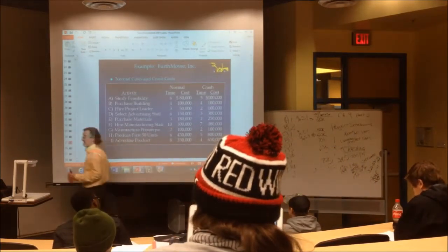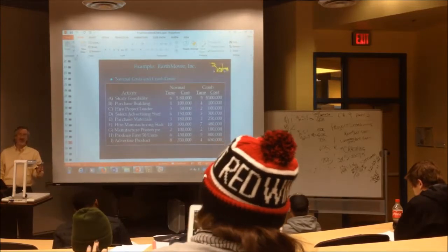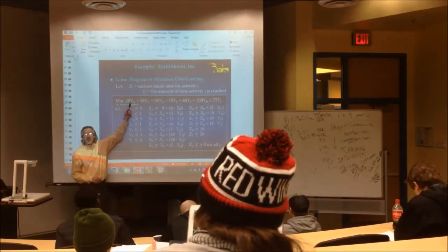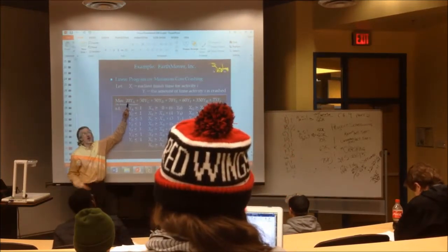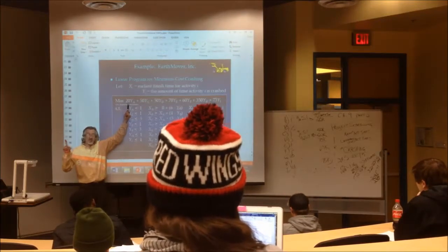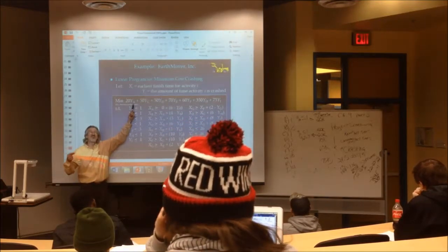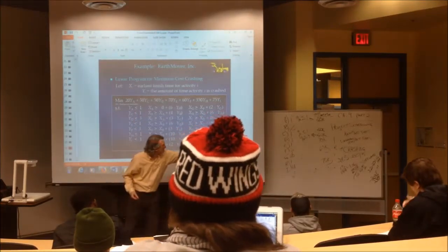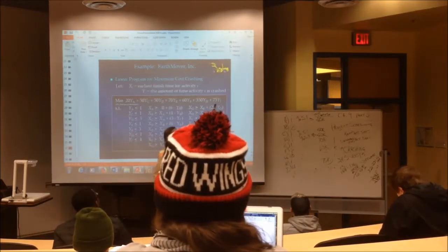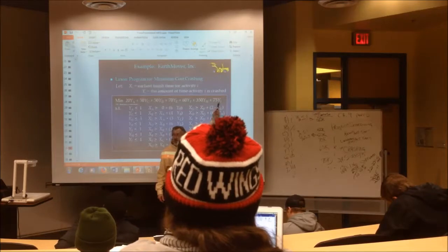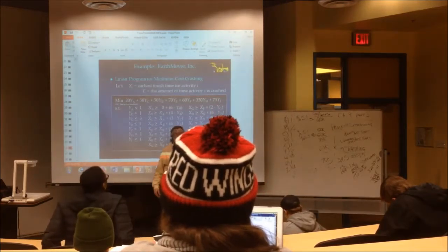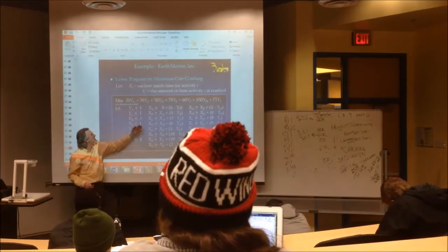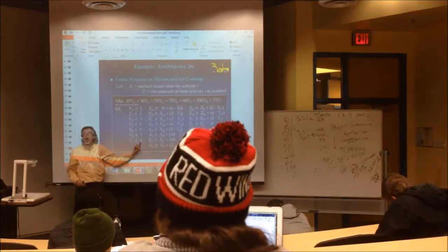That column you just made is basically setting you up to write your objective function. That little bit of math gave you those numbers. This is 20,000, remember this is in thousands. Minimize however much it costs for 1 unit of time crashing for that activity times the Y variable for that activity. Everybody hear that? So let's go straight to I. You said 75,000. That means in the objective function it would be 75,000 times Y sub I. So making those 2 columns is writing your Y constraints. Y sub A less than or equal to 1, Y sub C less than or equal to 1, Y sub I less than or equal to 4.